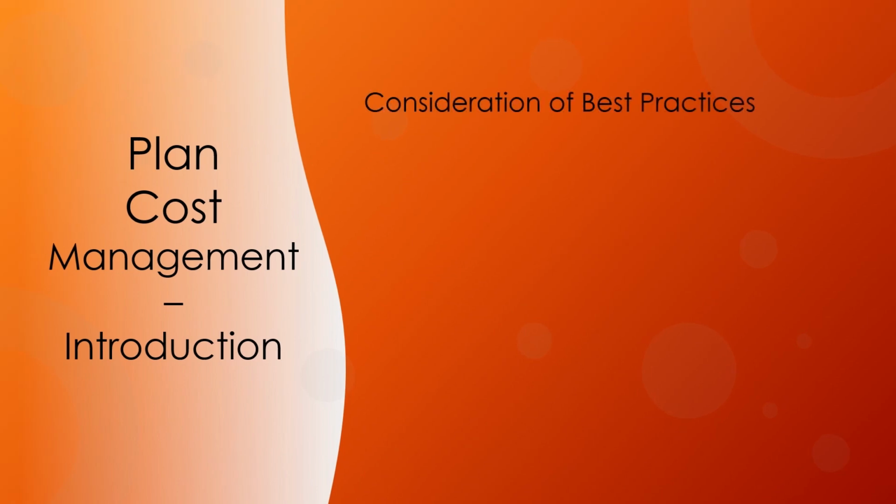Let's discuss some best practices which can help to navigate these challenges. Project managers and their team should invest time in detailed and accurate cost estimations, use historical data, expert opinions, and various estimation techniques to get a realistic picture of costs. When determining the budget for a project, project managers should build contingency reserves into the budget to account for unexpected events or risks that might arise during the project.